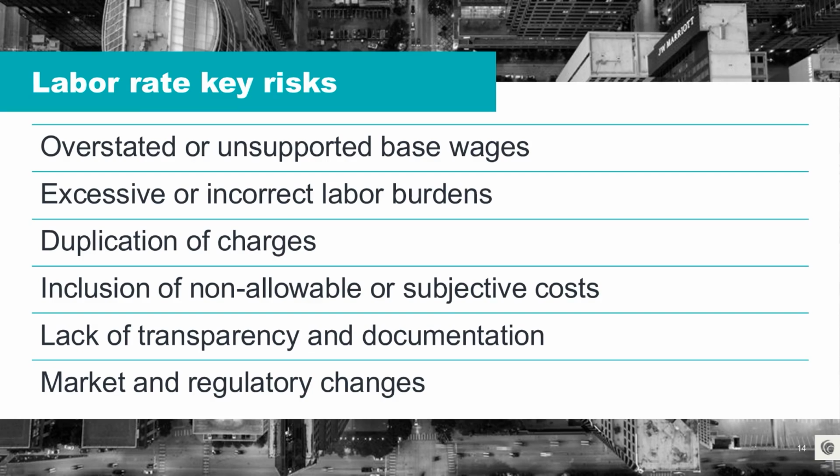Owners are sometimes charged for costs that are not necessarily incurred, or for embedded markups hidden within these burden percentages. Here again, you're going to request detailed breakdowns and supporting documentation for each burden component and compare those proposed rates to either statutory limits or actual cost support.